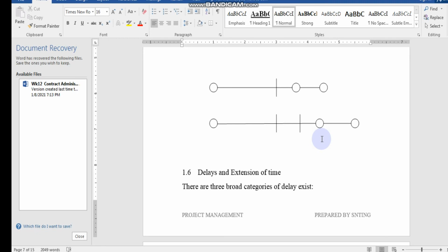So you have to get ready like 2 months ahead, get them to come out a few days before, right? Because appointments can be remade many times, you see. So we have to be extraordinarily careful. We do not want to be penalized because the authority is late in coming, or is not coming to visit your site, or is not giving you the OP or the road cert for the work, you see. So we have to be extra careful with that kind of condition. Just check on that carefully.